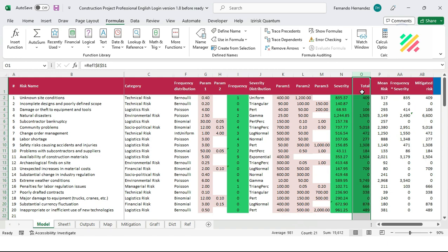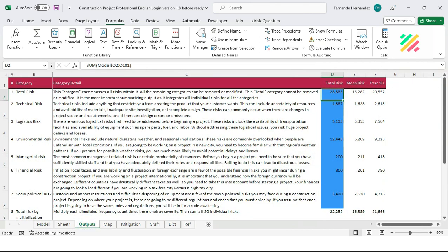Once these numbers have been drawn, Excel will take its natural course and will recalculate itself upon all the cells in the model. IziRisk will pick up those cells that have been previously declared as outputs and it will store the data on a repository. At the end of the simulation, IziRisk will ask whether you want to save the simulated data, since, up to this point, that data has simply been stored on cache memory.